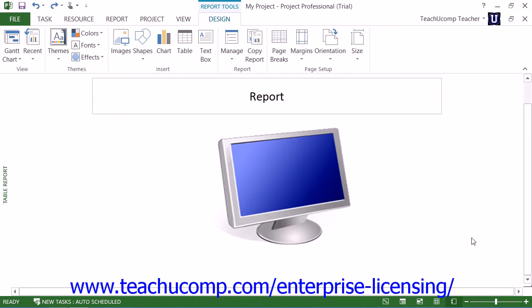Note that to use visual report templates, you must have either or both Microsoft Excel and Microsoft Visio installed in conjunction with Microsoft Project on the same machine. If you do, then you can create visual reports within Microsoft Project.